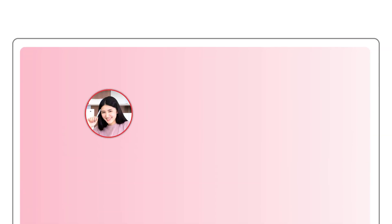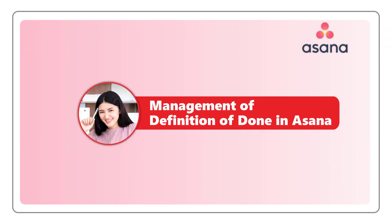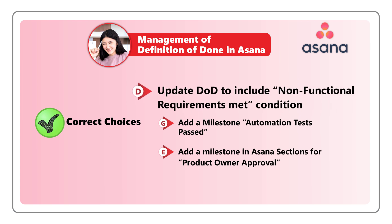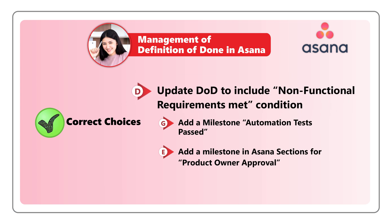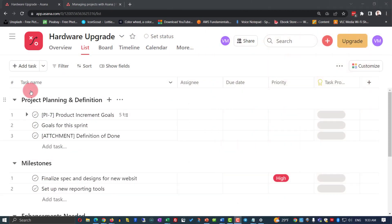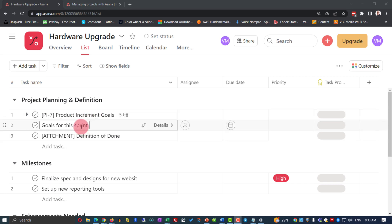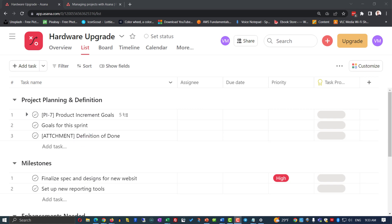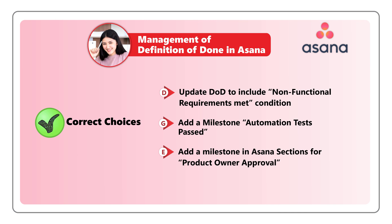So how can management of definition of done be accomplished in Asana? If you need to use choice D and update definition of done to include non-functional requirements met condition, you might decide to make changes in the project planning and definition sections inside Asana. This section consists of product increment goals, goals for the sprint, as well as an attachment — probably a Microsoft Word file — with the definition of done.